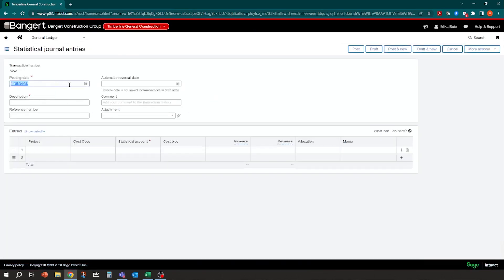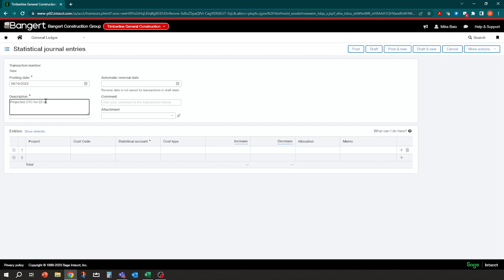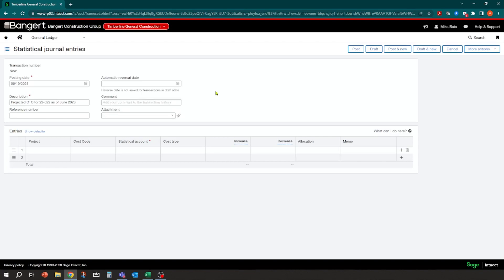But basically the idea is you can come into here and you can click add. And you can put in a posting date. So for the month of June, we're going to do our forecast. You can say, I'm going to do my projected cost to complete for 22-022 label with the job as of June of 2023. You can put in comments here, you can put in attachments if you do have some backup, what your projections were based on.